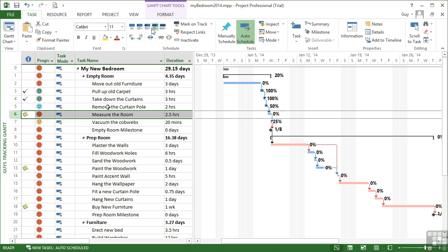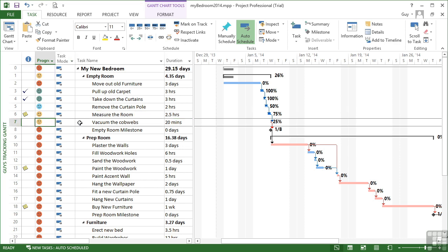Yellow smiley face, which has pushed the summary task over the 25 threshold and has changed its graphical indicator to a yellow nonchalant face. So you can see that not only are the normal tasks indicators working, but the summary ones are as well. As they reach the correct threshold for that summary, it's pushed over to the next graphical indicator.